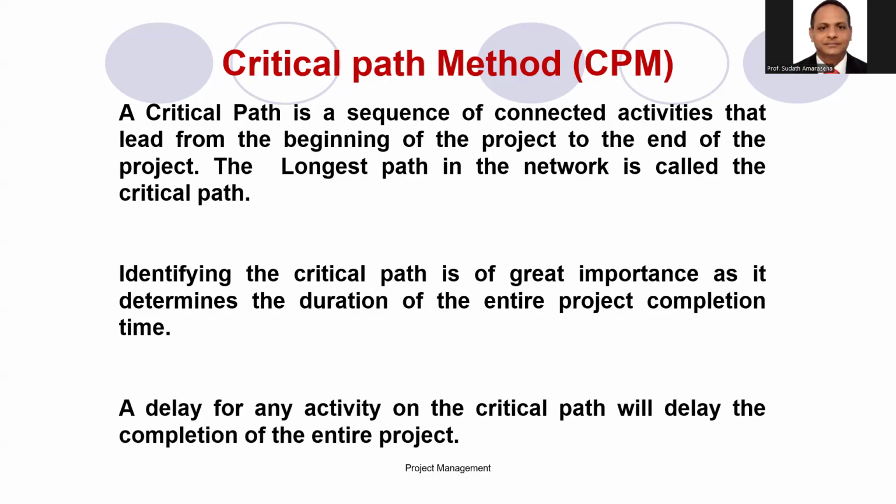Likewise, remember we can't delay the critical activities. Delay of any activity on the critical path will delay the entire project completion time. Right? But non-critical activities, we can delay to some extent without affecting the entire project completion time.